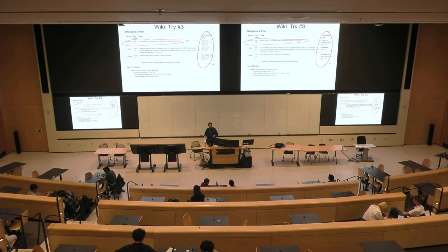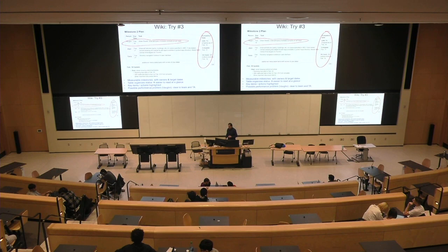So writing it down is part of having a conversation with me and making that conversation visible to the TA. This is also best practice in industry. If there's a problem in a team, I expect the members of that team to talk about it, try to sort it out, and then if it's not getting fixed, I expect them to escalate it to me, if I'm the manager or the director of that team. I don't expect them to escalate it to me before they've talked about it amongst themselves at all. But if they have done that and it's not getting better, they should make it visible. And that's what this does, okay? So yes, this is my recommendation of how you should organize your wiki.